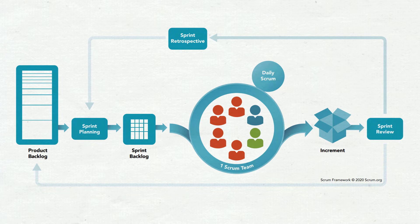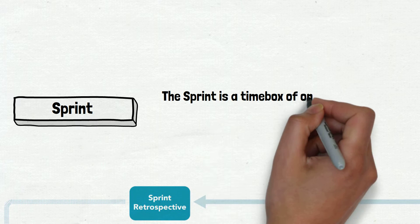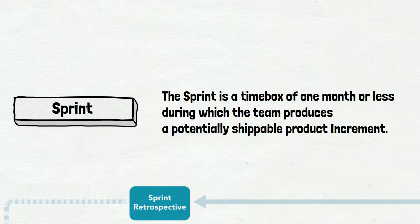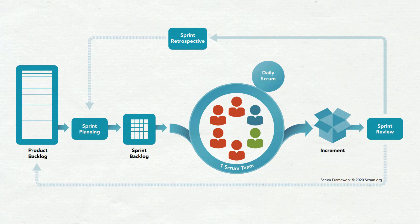The next item on the schema is sprint planning. Before we talk about it, we need to discuss what a sprint is. The word sprint appears on the schema four times. The sprint is a timebox of one month or less during which the team produces a potentially shippable product increment. Scrum is iterative, and the iteration is called a sprint. The iteration lasts from one to four weeks — the most popular are two-week iterations. It starts with sprint planning and ends with the sprint retrospective, as you can see on the schema. Scrum is also incremental, meaning it ships small portions of the product. Very often, teams release to production every sprint, even if it's not mandatory in theory.